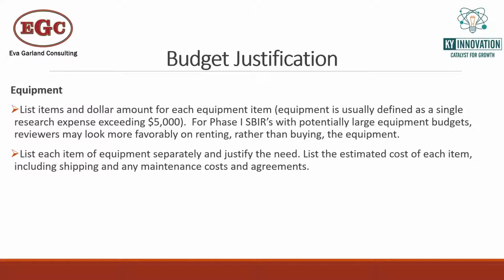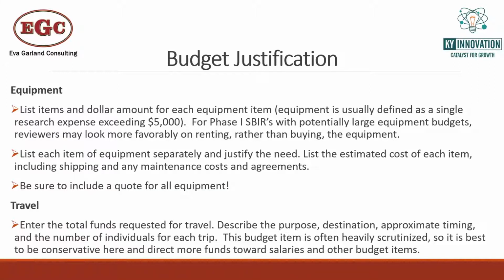Each item should be listed separately. Make sure you're justifying the need and the cost, and make sure that you include a quote for the equipment item that includes all of the bells and whistles, the shipping, maintenance costs, and associated costs.